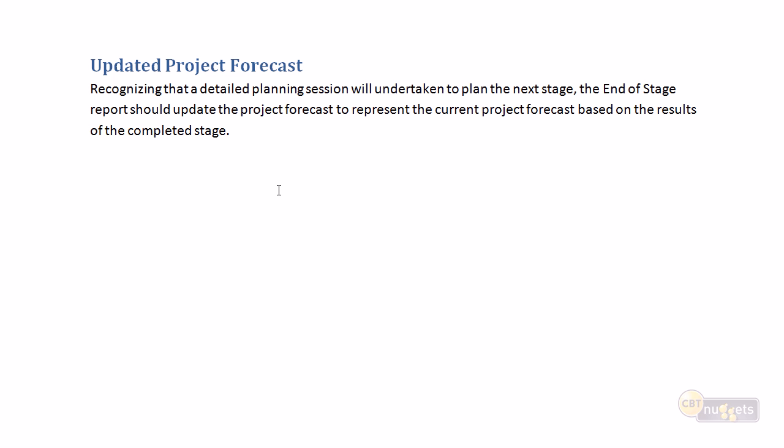My budget for stage X was $30,000. I actually spent $41,000, just under my tolerance. I didn't have to go to an exception report. So therefore, I have improved actuals to put into my forward-facing forecast so that when I add in my updated plans for the remaining phases, I can get a very realistic forecast for what the remaining of the project is going to be.